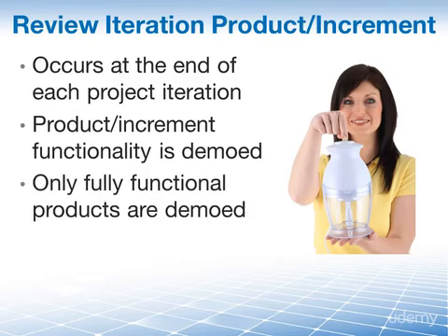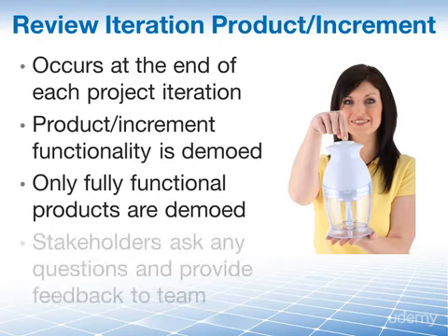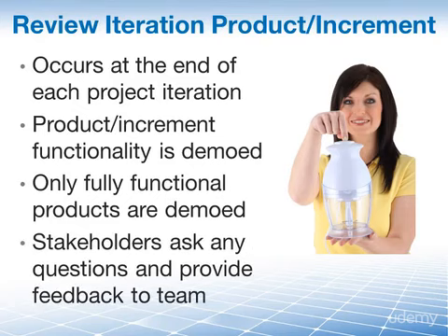It is important that the team presents complete working products and not prototypes or documentation describing how the product would or should work to customers and stakeholders for review and analysis. Stakeholders and customers ask questions about the product and provide feedback, which the team then translates into new user stories that may be added to the product backlog for inclusion in future iterations.